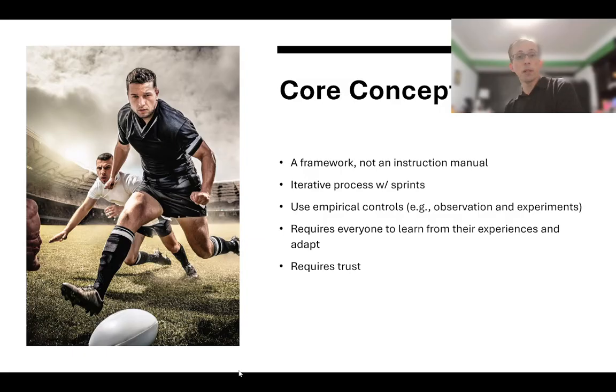It is an iterative process. You go through it in 1 to 4 week increments where you are going to be delivering a usable system at the end of each increment. It requires stakeholders, such as developers, to learn from their experiences and to adapt.